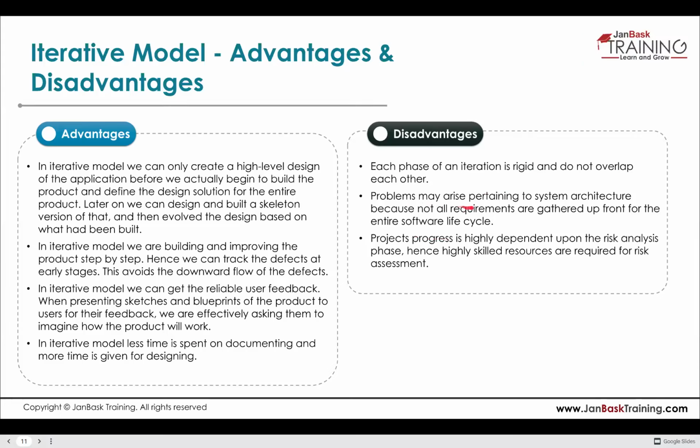Problems may arise pertaining to system architecture because not all requirements are gathered upfront for the entire software lifecycle. In the other models, the requirement was fixed. But in this case, the requirement is not fixed. We come up with a small chunk of requirement, do our designing, implementation and testing, and then go back and take the new requirements.